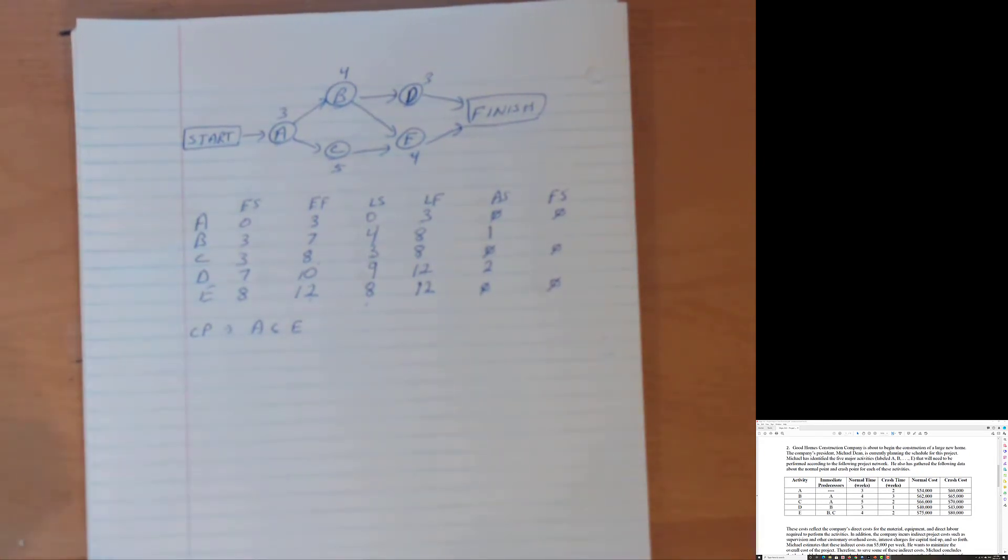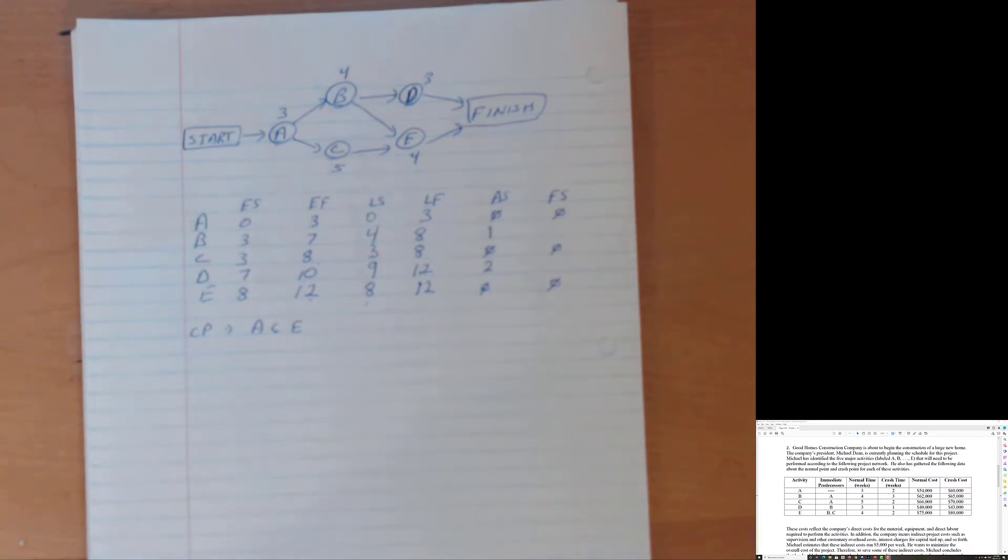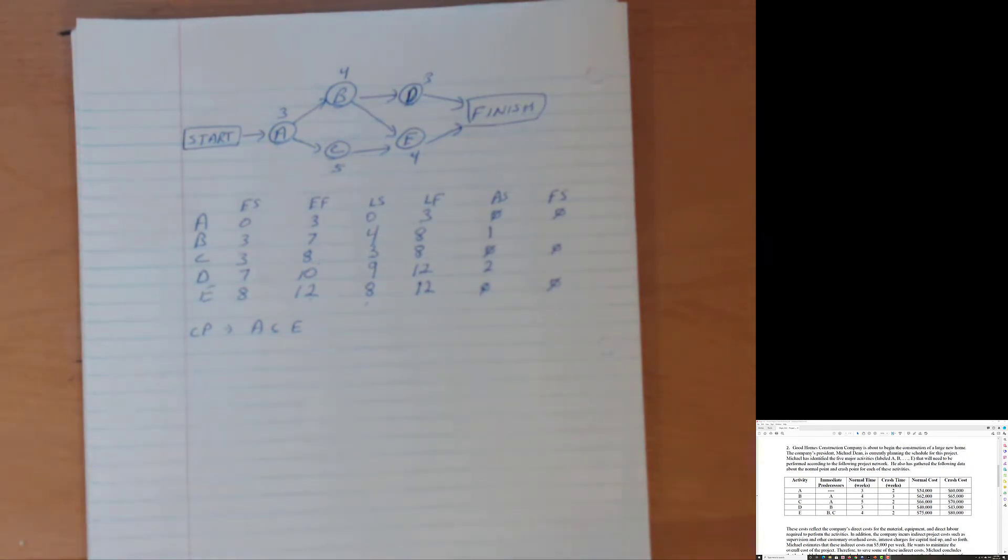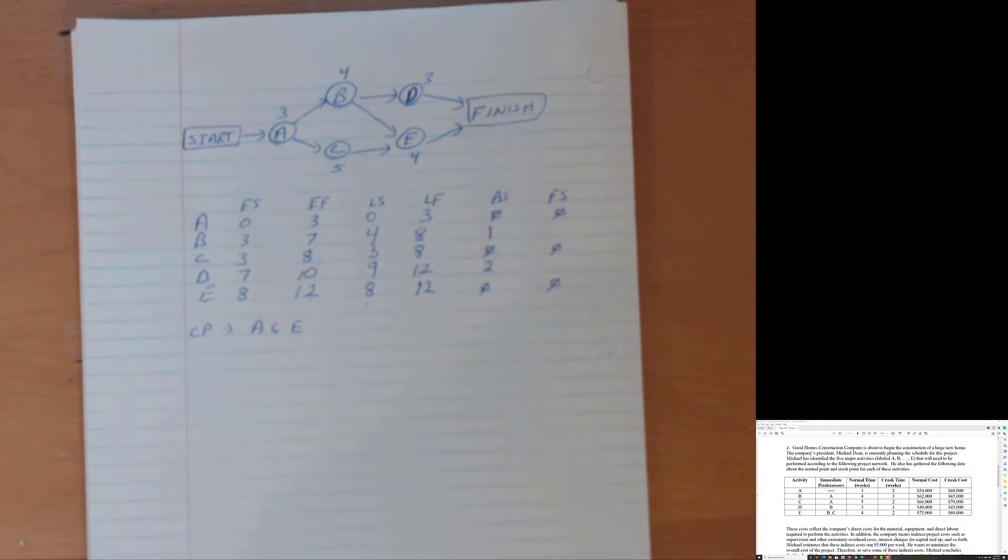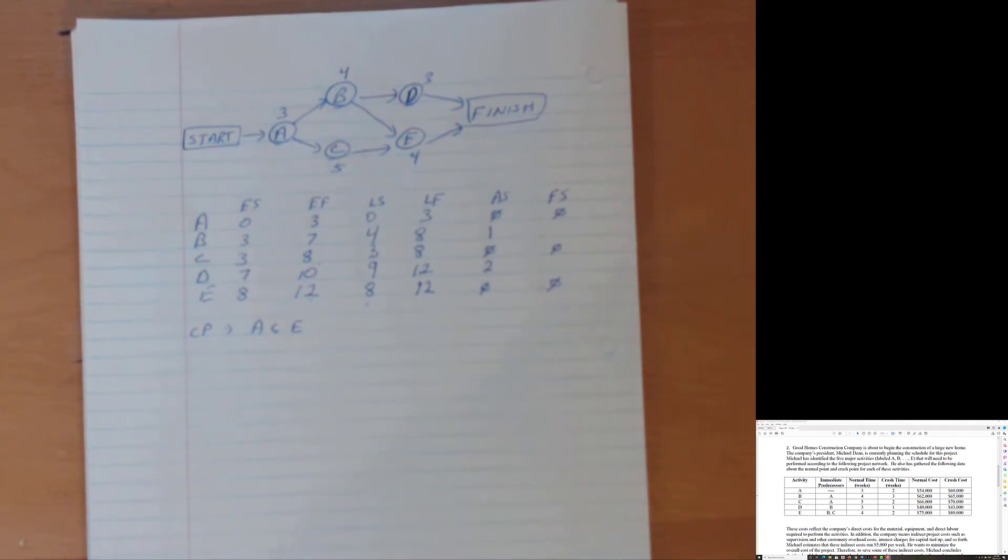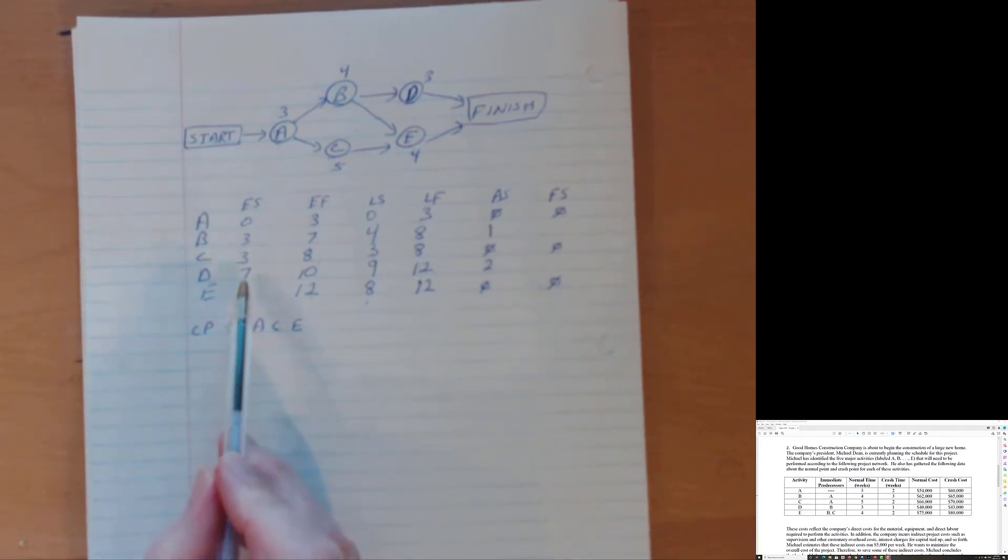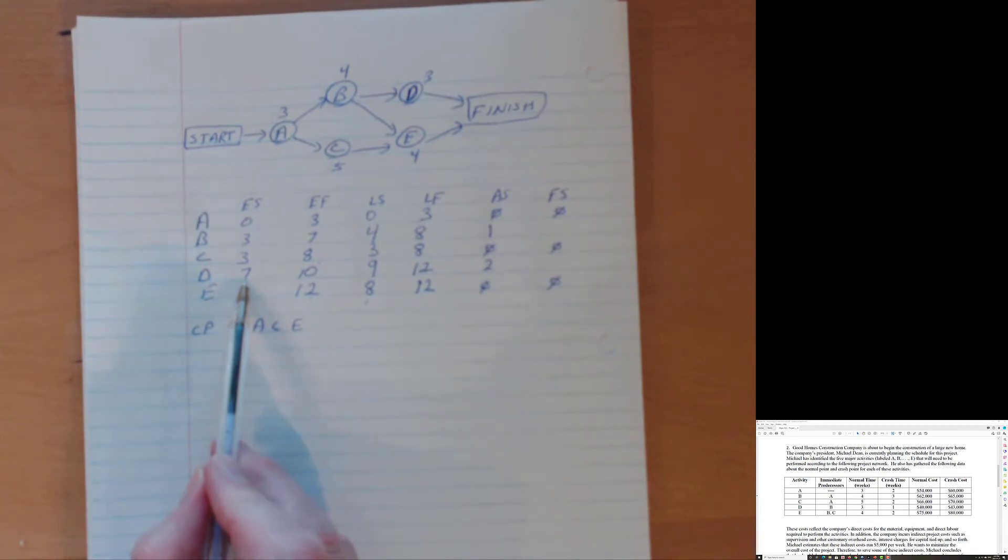Now, free slack. Because B and D have activity slack and are not on the critical path, they may have free slack. They may not have free slack. Free slack is a tighter condition. And we recall that free slack is the time that an activity can be delayed before just the next activity is delayed. So let's look at B first. So B leads to D and to E. And D and E, D starts on, so we start, look at the first step is to look at the early start of the next activity. And I look at D and I look at E, and the early starts of those activities are seven and eight, respectively. So we zero in on the smaller of the numbers, which means B has to be finished by week seven. Otherwise, D will be delayed.